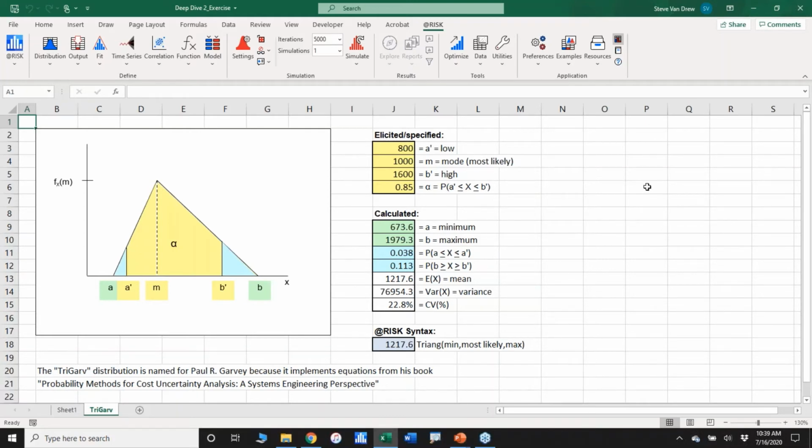It says, and I'll quote it pretty closely to the way I remember it, thou shalt, almost like a Bible, thou shalt ask for and interpret the results as capturing 70%. And that 70% leaves 30% unaccounted for, which some people might then think means it's going to be at the 15th and the 85th, because 15 below, 15 above accounts for that missing 30%.